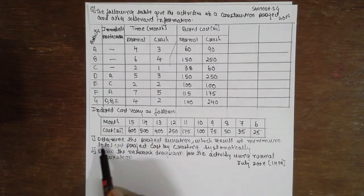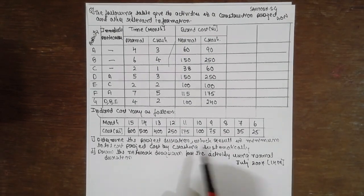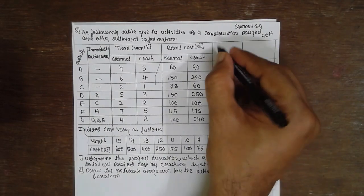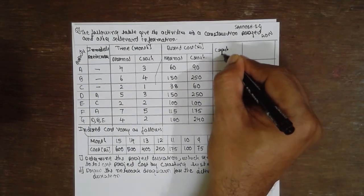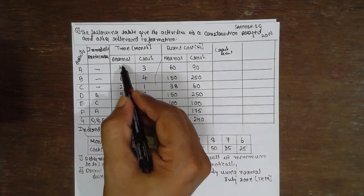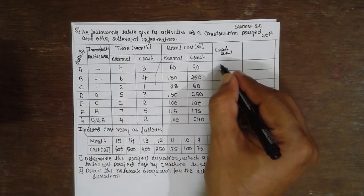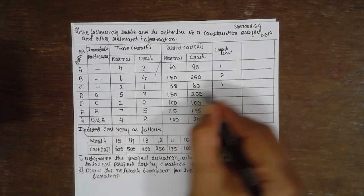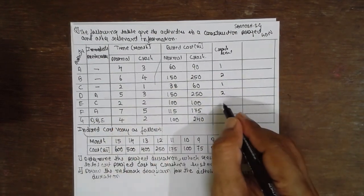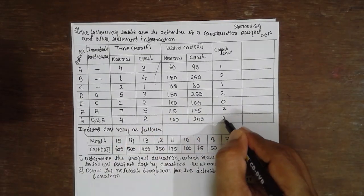Indirect cost is given in a separate table. We have to determine the optimum duration and the cost. First, we are going to find out the crash limit. The crash limit is normal time minus crash time: 4 minus 3 is 1; 6 minus 4 is 2; 2 minus 1 is 1; 5 minus 3 is 2; 2; 0; 5 minus 7 is 2; 4 minus 2 is 2.